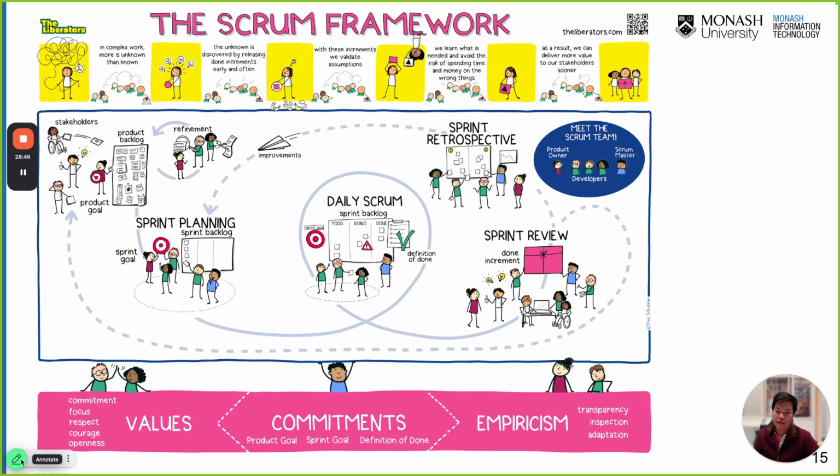Initially you start as a business analyst, you talk to the stakeholder. What kind of features do you want? And then you collect the requirement. This is what you did, right? And then you extract the requirement and translate it into the product backlog. As an end user, I want to log in, and so on.